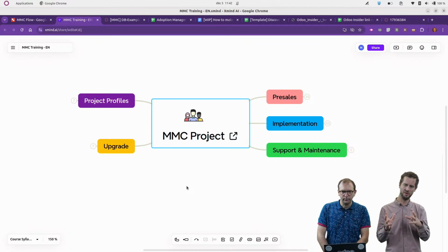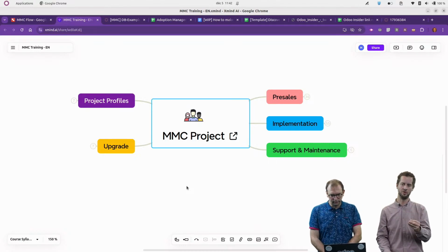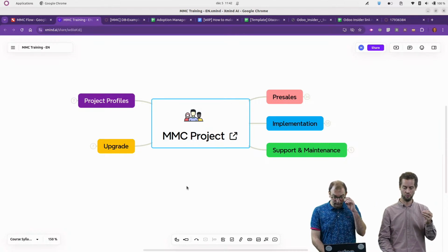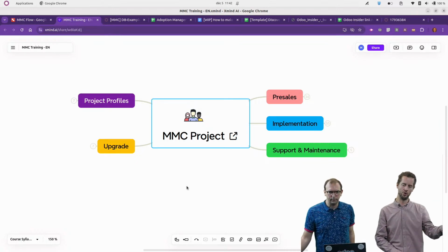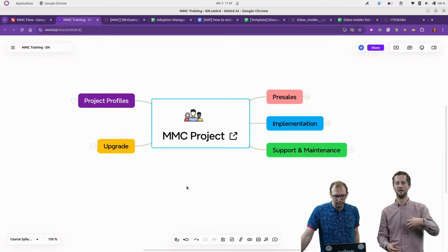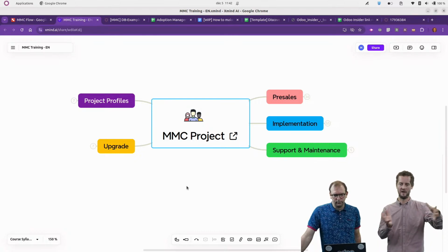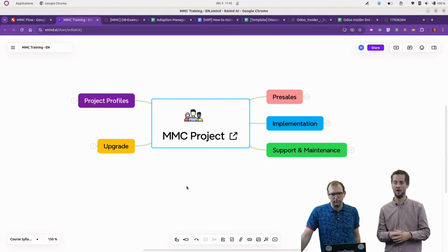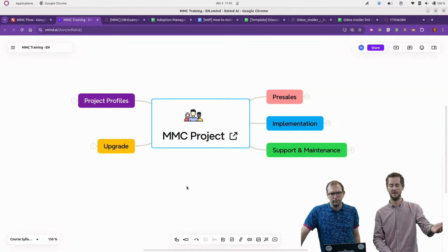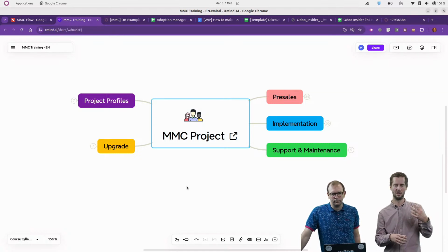We had to guide them to report the issue they face, because if there is something to fix, they have to notify their project team on the customer side. The project team will either find a solution immediately by adjusting some configuration or provide training, or if there is really a bug, they can report it to us, and then we can fix it.